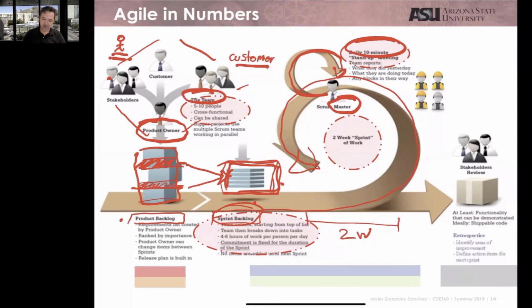You know what? From this set of tasks, I am doing 2, you are doing 3, someone else is doing 1 because it's very complex, whatever. Each of us is going to report to all the others if the tasks that we are doing are going well, if we are going to finish on time, or maybe we already finished some of them or not. The key idea is during the 2 weeks, every single day, the whole team knows if the project is moving forward or not.